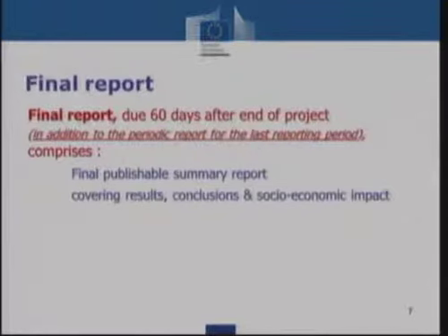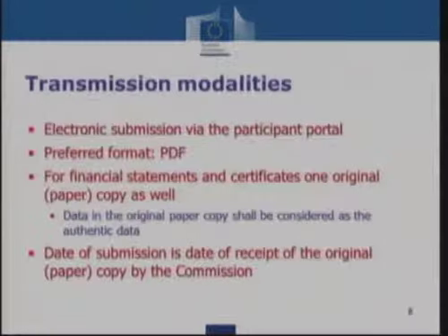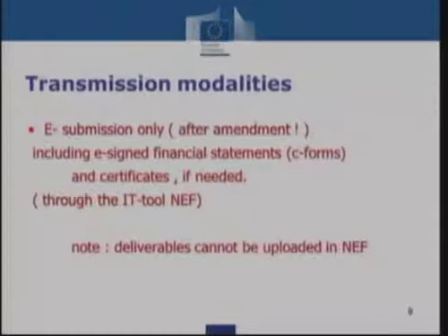They will also look at the way the project is managed and at the expected impact. Normally, 6 months before the end of your reporting period, I would expect that you have been approached by the project officer in order to define the review date and to communicate to you the review experts. The project officer should well in advance try to find out which experts would have the right expertise to assist in doing this whole exercise. Typically, there are 2 up to 5 experts who will be with the project officer.